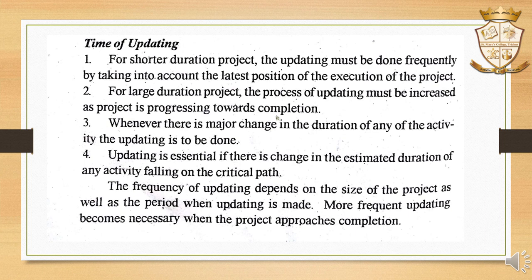Whenever there is a major change in the duration of an activity, updating is to be done, and updating is essential if there is a change in the estimated duration of an activity falling on the critical path. In these four cases, we have to update our project duration.